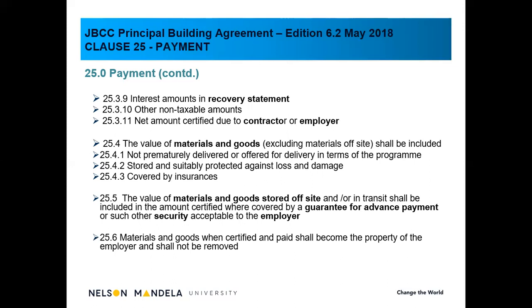25.4.2, stored and suitably protected against loss and damage. It is there on site. And also it is covered by insurance. So those are typical questions that you're going to ask the contractor. We've got 10,000 bricks on site, and there are pockets of cement in the store. I'm going to include that in the certificate. Is it insured?